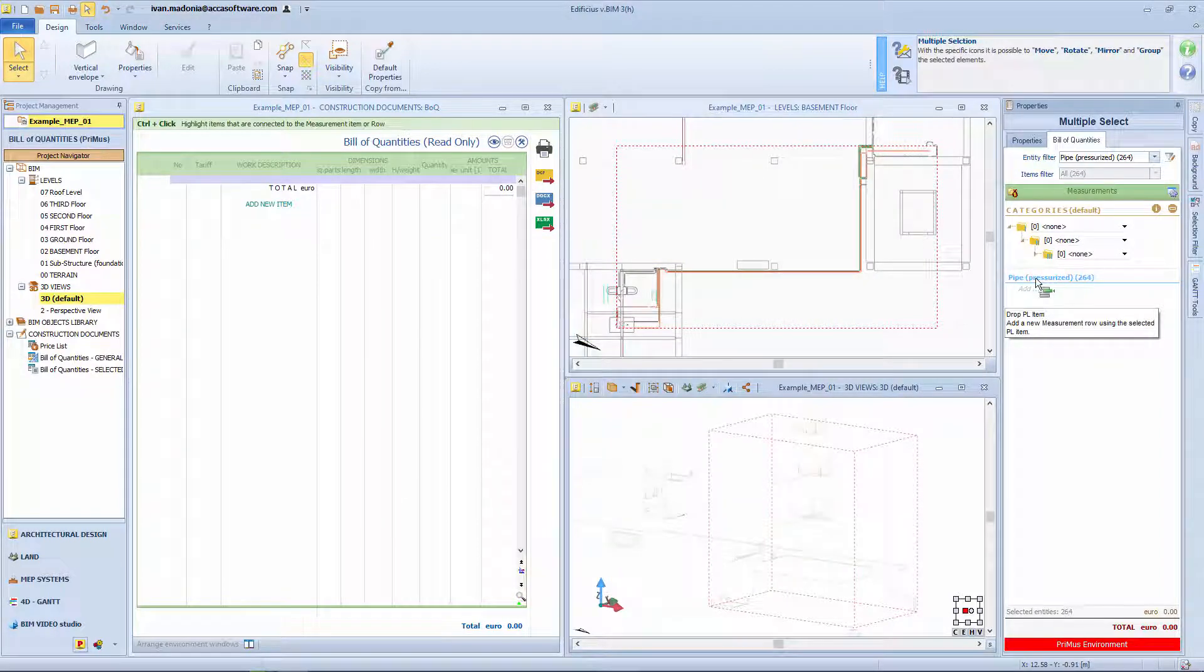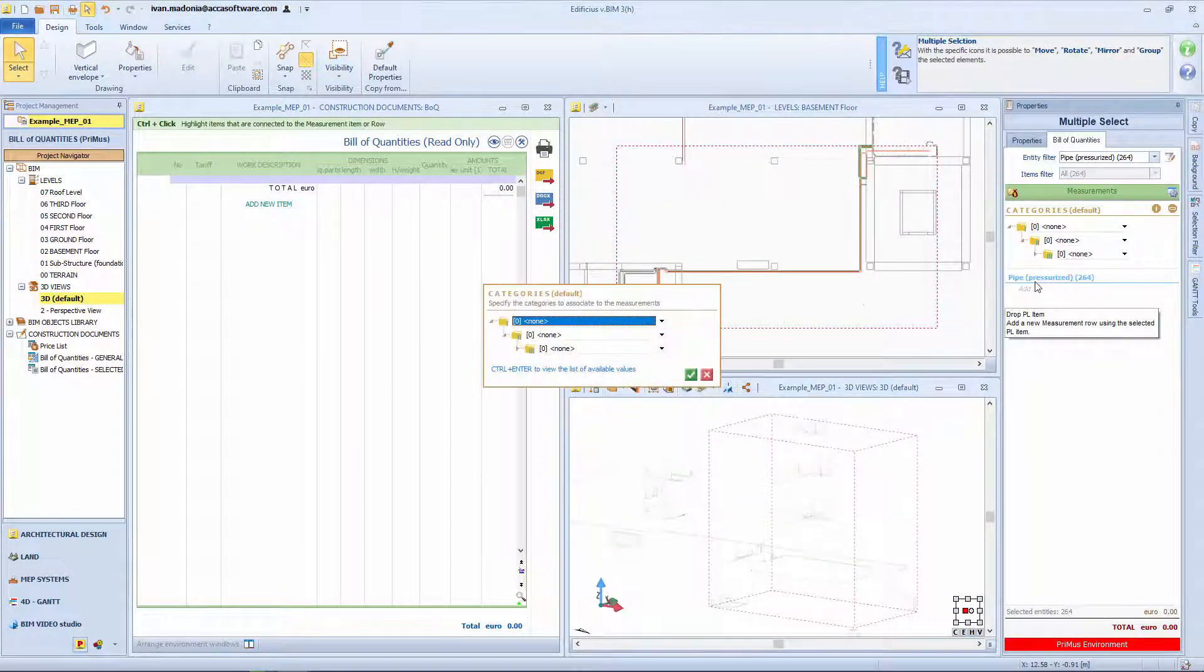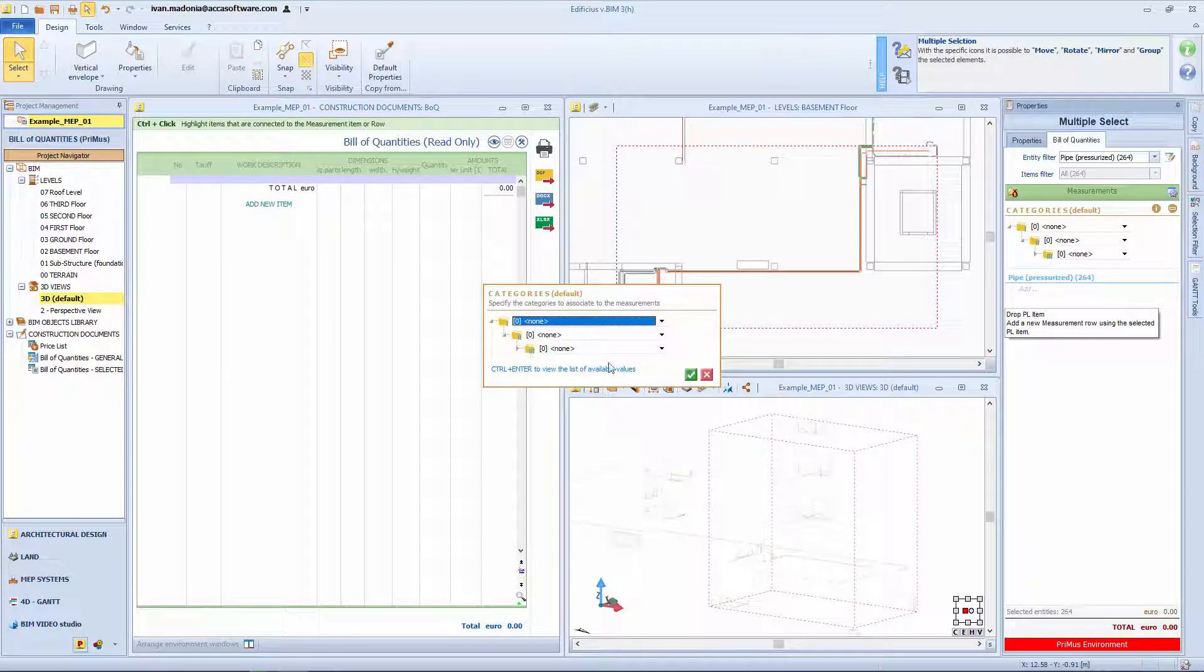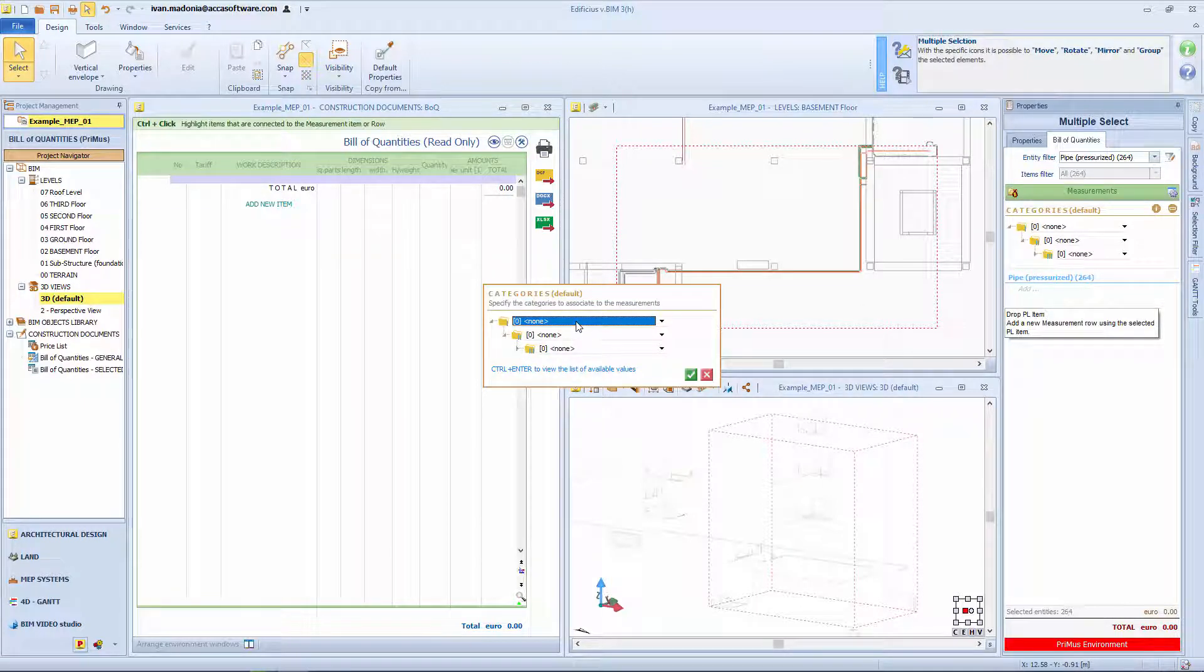Now release the Price List item. At this point the Categories window appears allowing you to organize your BOK into work sections or supercategories, categories and subcategories.